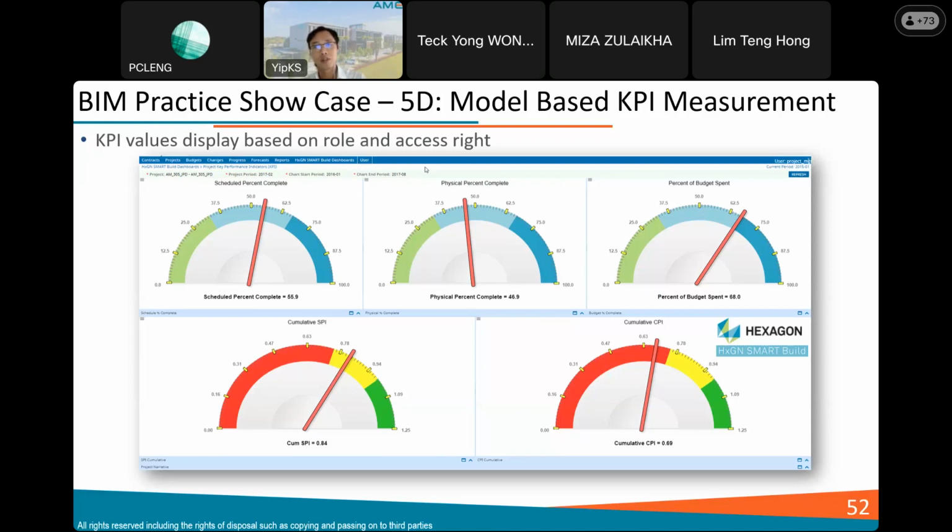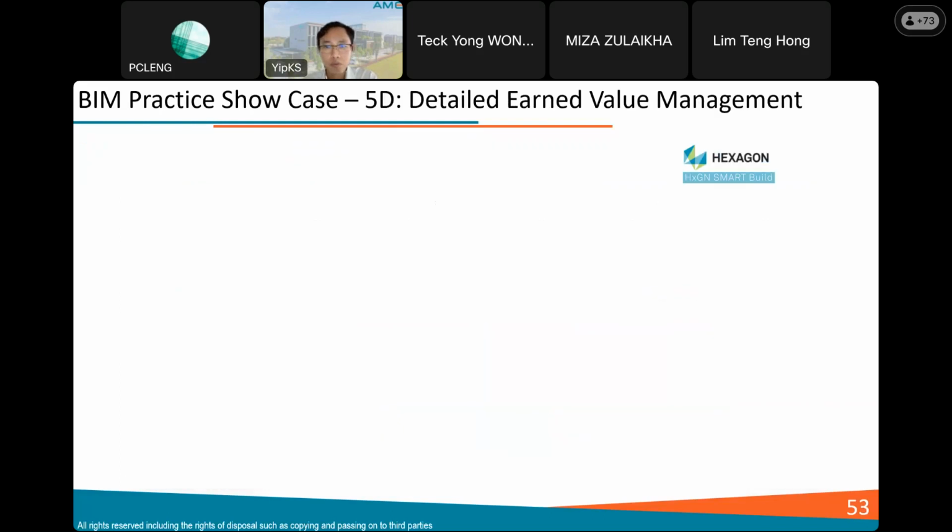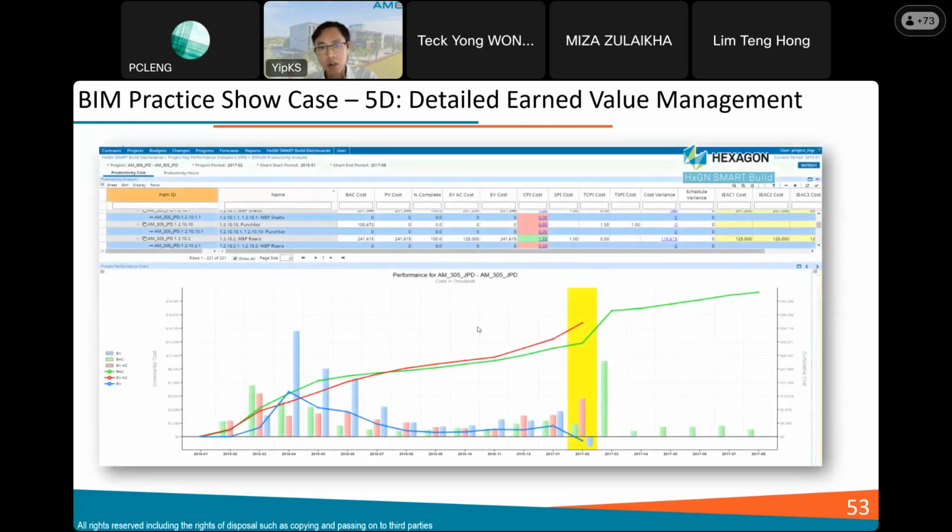These two models are based on different breakdown structures, and usually they don't talk to each other. The relationship between these two models is a many-to-many relationship. So doing it conventionally in an Excel environment is very complicated, but can be done. By using this BIM technology, this can be easily done. It's one of the very important elements we extract from 5D. It's very important.